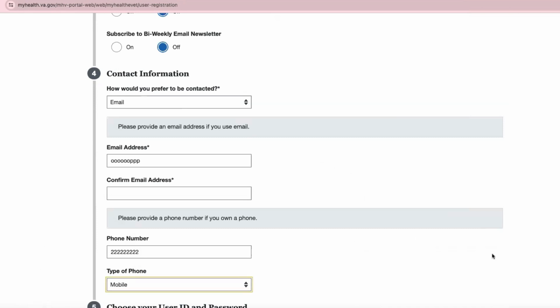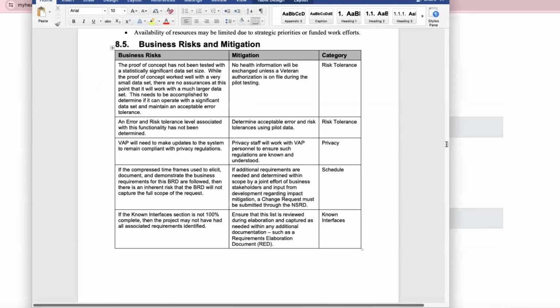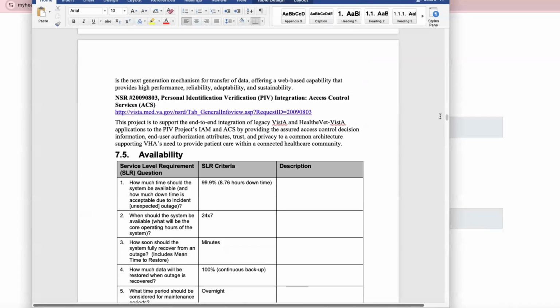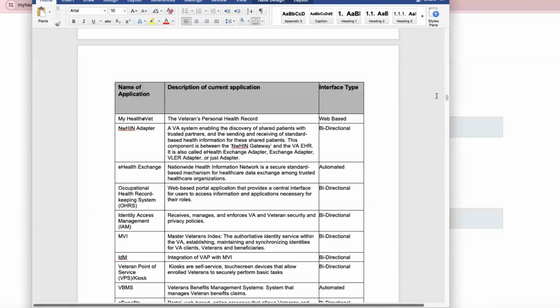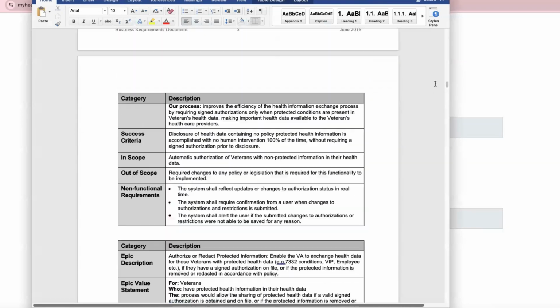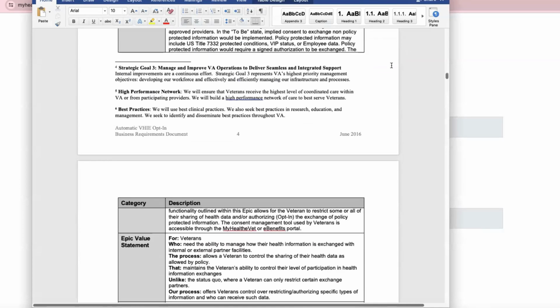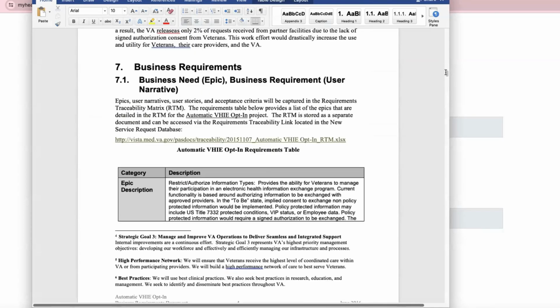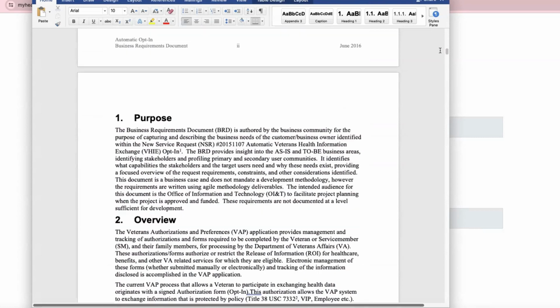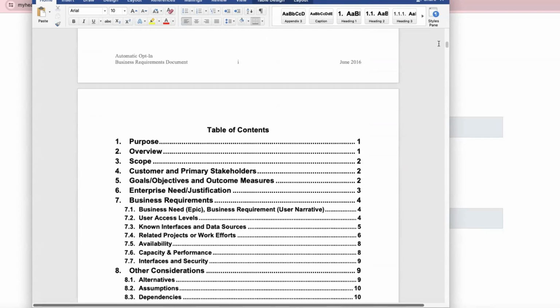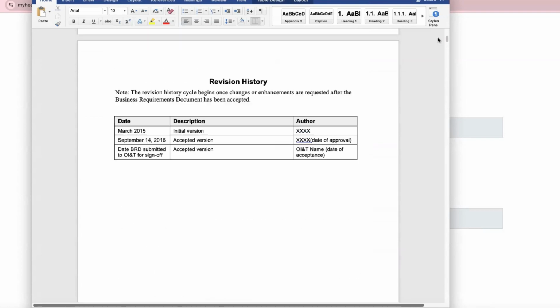Once the BRD is completed, then only we will start the work, or will developers work parallelly? No, no, no. For the BRD, we have to get sign off. Yeah, because without that we cannot start, right? So once we get the sign off approval, only then we are going to start working.